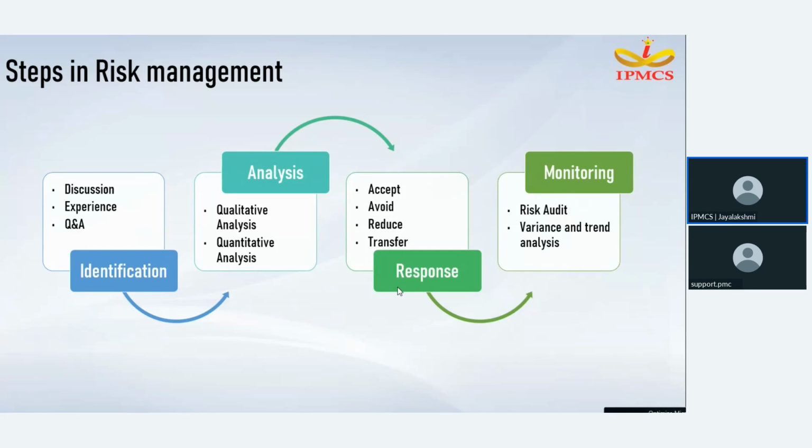We have four kinds of response: accept, avoid, reduce, and transfer. Accept simply means we are accepting the risk once we have identified it, and we will prepare ourselves to meet this risk and its impact.